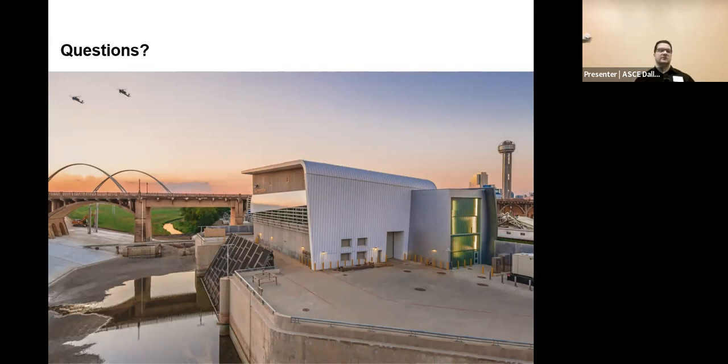And so FlowServe came out each time. They made sure we had inspection of everything. Even at the gearbox in Lufkin, they tested it and made sure everything was working. But the design itself for all those components was from FlowServe. And then we made FlowServe provide everything. We didn't want one company to provide the motor and another the pump and have to deal with that. So the pump manufacturer had to provide all pieces of the pump, including instrumentation and how it's programmed. That way it's just one source, and if anything happens, they have to be the one to fix it.